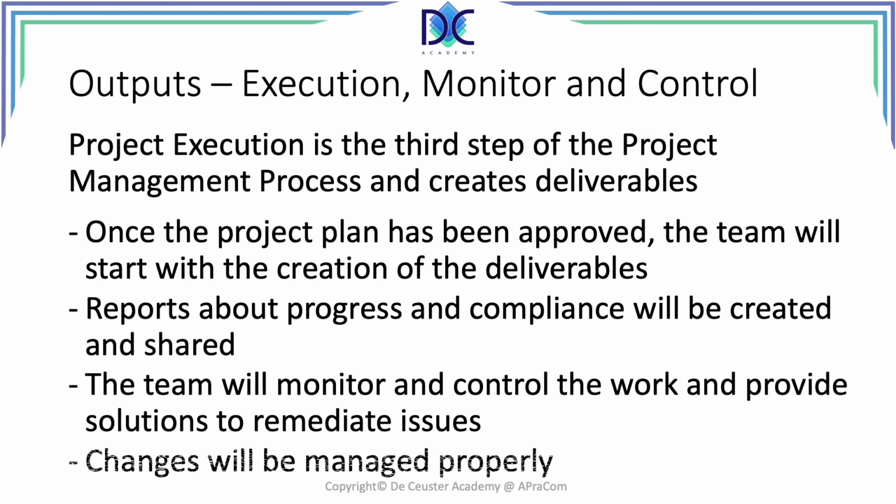The last thing here is about changes. We have to manage changes according to a predefined process. Changes cannot just be implemented like that. Changes have to be evaluated and presented to the change control board. And once the change control board accepts a change, it will become part of the project. It will be integrated in the project management plan, and we will create new baselines.